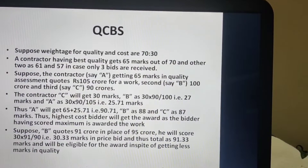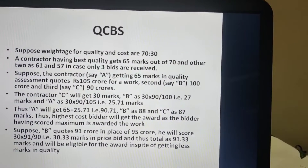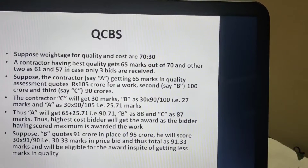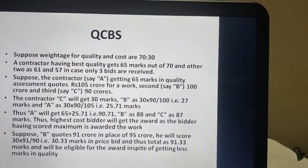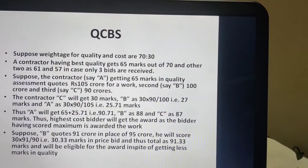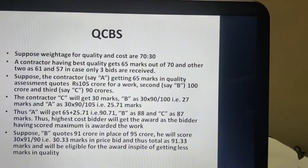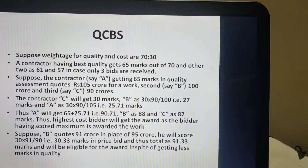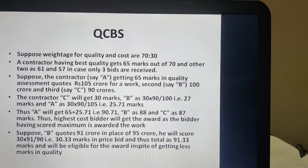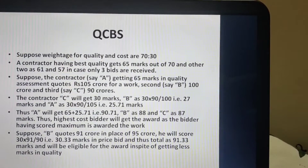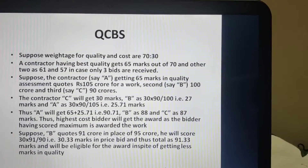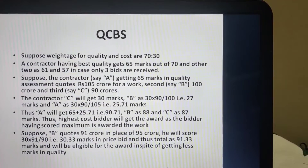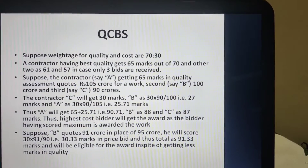Suppose a contractor having best quality gets 65 marks out of 70, and there are three contractors A, B, and C. Contractor A gets 65 marks in quality assessment and has quoted 105 crores. Contractor B, who got 61 marks, has quoted 100 crores. Contractor C, who got 57 marks in quality assessment, has quoted 90 crores.